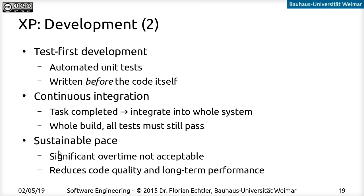Another important aspect of Extreme Programming is a sustainable pace. Developers should not be required to do overtime, because that reduces long-term performance — code becomes sloppy, quality goes down, and that causes problems in the long run. XP suggests that when people have to do overtime, that's a sign of bad planning and bad management for that cycle, and it would rather recommend dropping features than cramming everything in before the deadline.